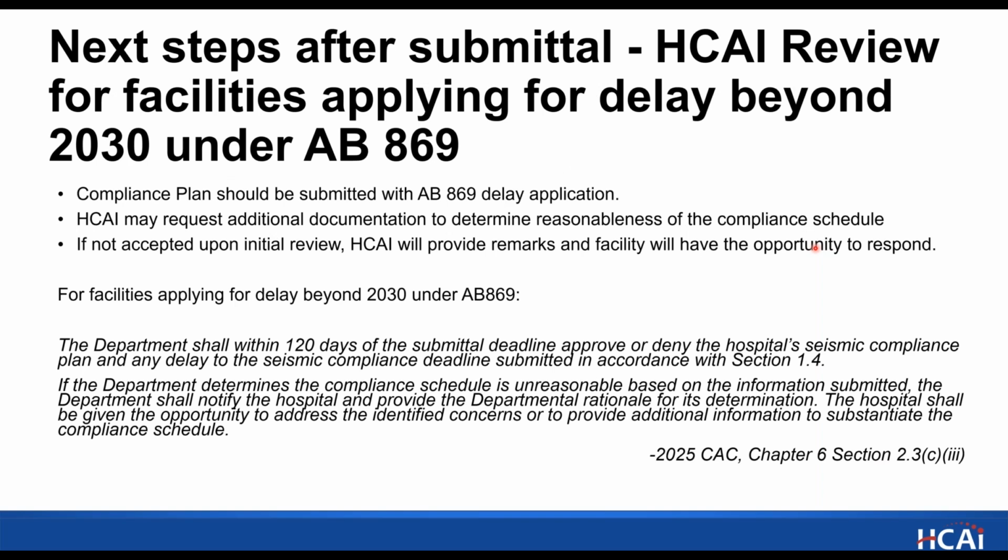So if a delay is asked, and for the facilities who are eligible, the compliance plan and the delay request should go hand in hand. So what we are trying to say here is, let's say a 2-year delay is requested. We'd like to know why that 2-year delay is necessary. So a lot of those answers are actually in the compliance plan.